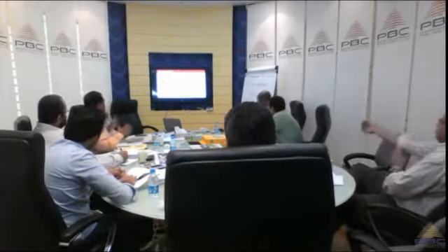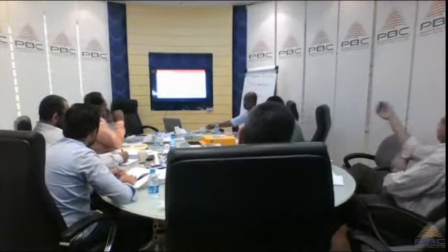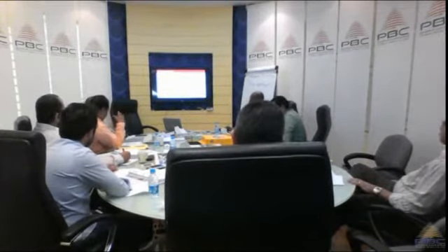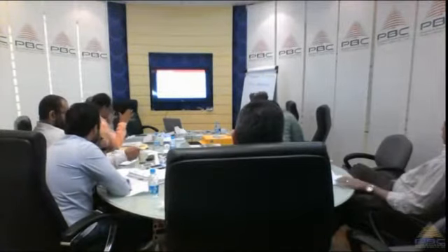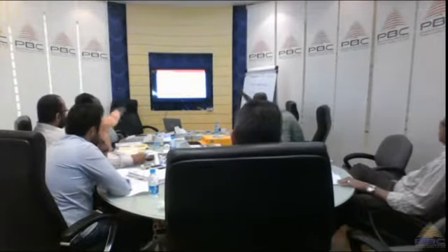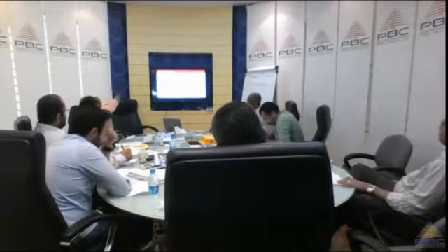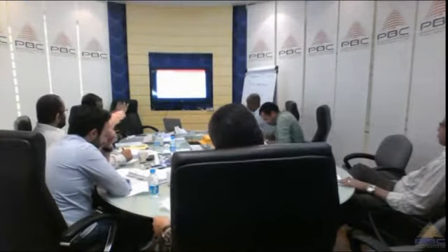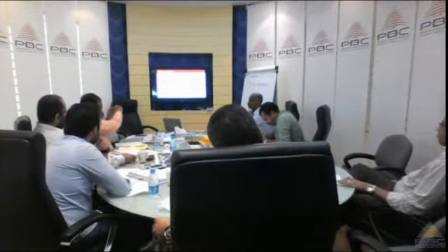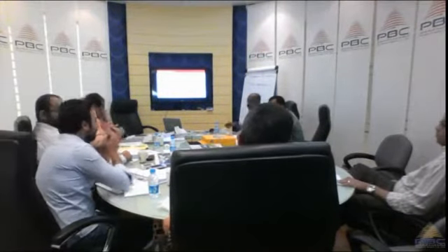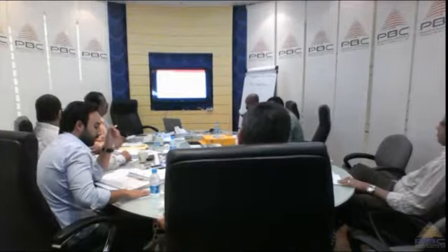So control schedule. After we define the scope, we have the time of construction. We have a starting date and end date. The project management team will prepare and develop the project plan, the work plan. So we have a schedule with all the tasks and all the activities, the defined duration, the resources, and the estimated duration of each activity. And when we establish this schedule, we will see some of the activities have float zero, meaning critical activities.